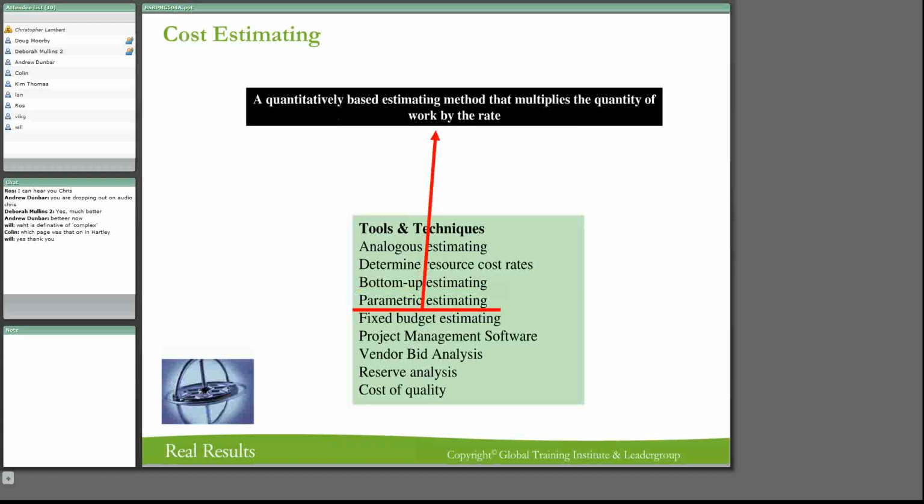So when you do something so much per meter, fencing is another good example where you're going to get a parametric estimating. So wherever something is the same over and over and over again, you can use parametric estimating. Second one is fixed budget.